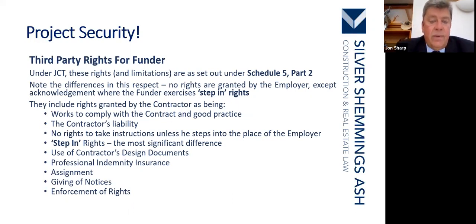They include rights granted by the contractor: the works to comply with the contract and good practice, the contractor's liability, no rights to take instructions unless he steps into the place of the employer, step-in rights, the most significant difference, use of contractor's design documents, professional indemnity insurance again, assignment, giving of notices, and enforcement of rights.